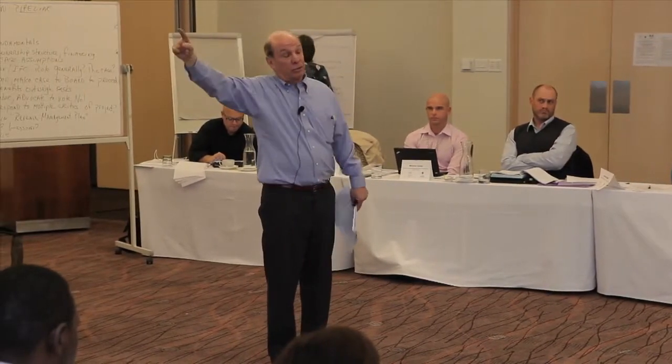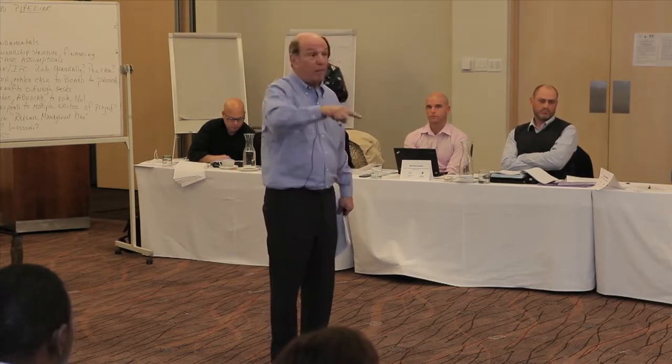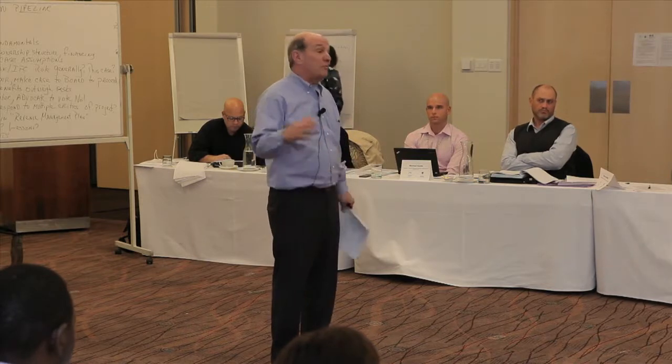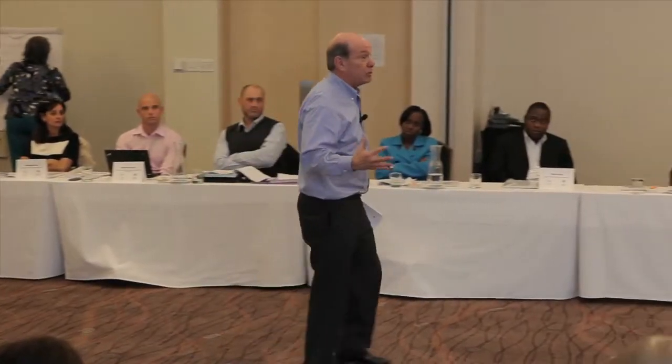Now it goes up and down, but if you look at what happened between 2000 and 2010, or even 2012, you'll see that although it was volatile, it never went back down to 20 again. It went up, up, up. So, in partial response to your question, this project turned out to be an absolute bonanza financially for everybody, because the amount of revenue generated was by orders of magnitude far greater than what that base case projection said it would be.